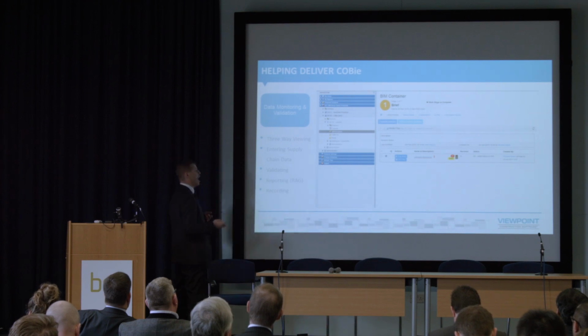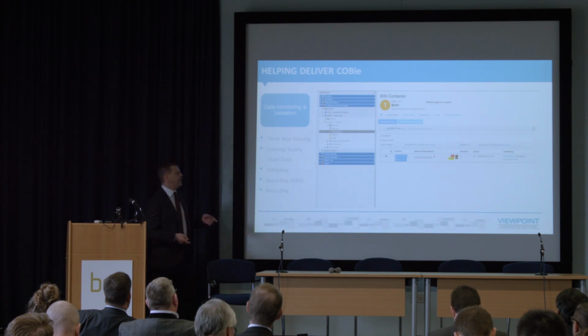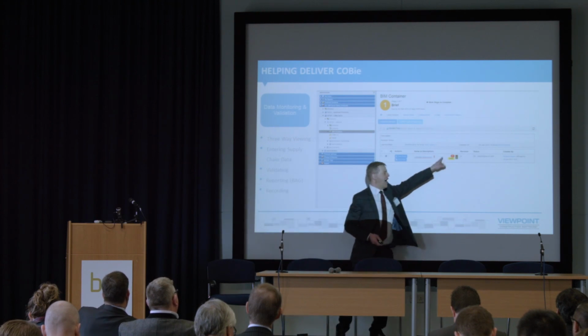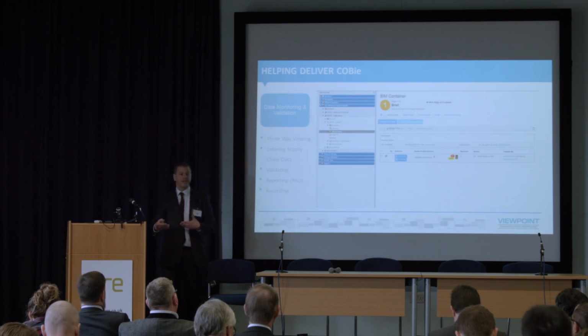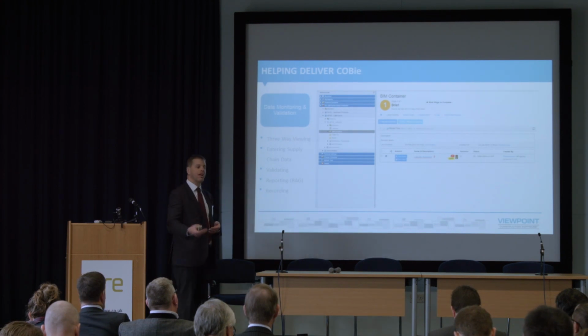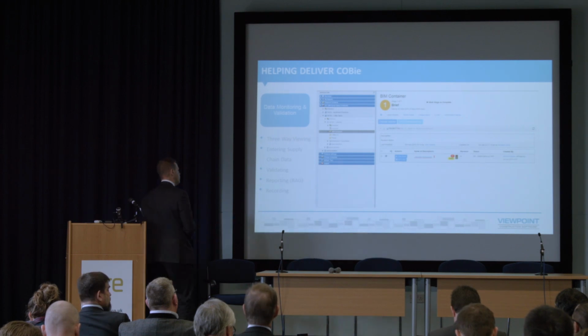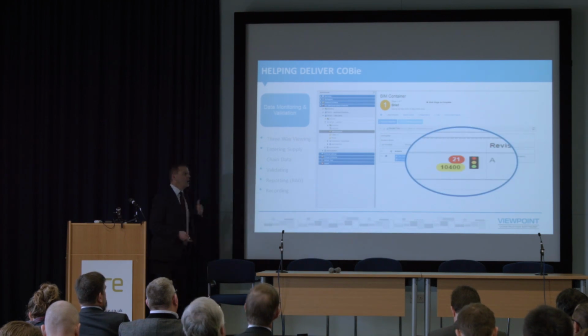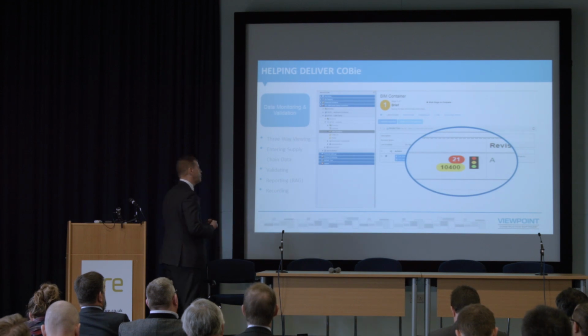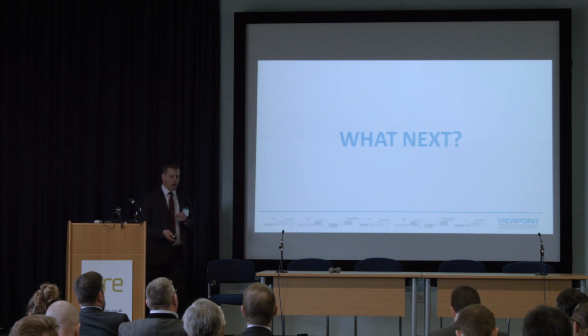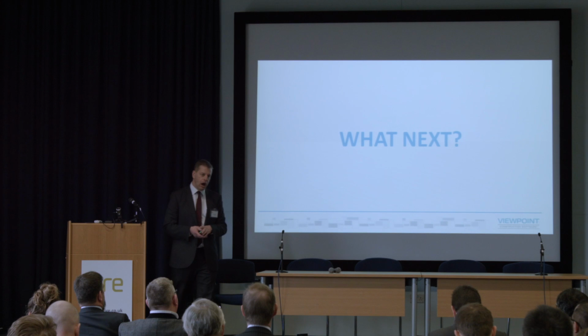And of course you need to be able to RAG report on that information: see how many items, how many fields within COBie are incomplete that you thought should be complete at the given work stage, and report on that and set tasks if people are beginning to perform. All of these things, like task setting, have been around for a while within common data environments in terms of documents, but are only starting to be the case within the data side of things. So that's pretty much where I think a CDE should be now.